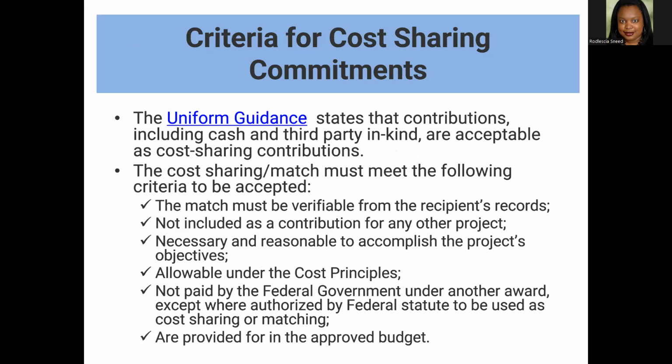The match must be verifiable from the recipient's records, not included as a contribution for any other project, necessary and reasonable to accomplish the project, allowable under cost principles, and not paid for by other federal grant awards except if it's authorized by federal statute. So again, you want to be careful that you're following all the guidelines of your grantor.